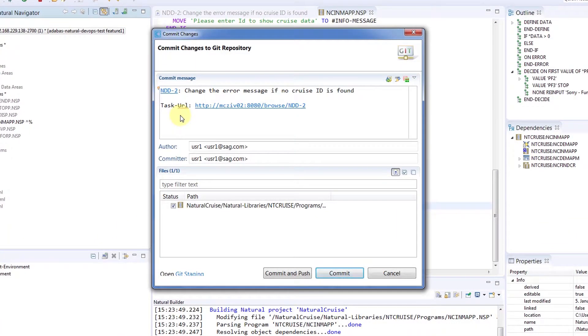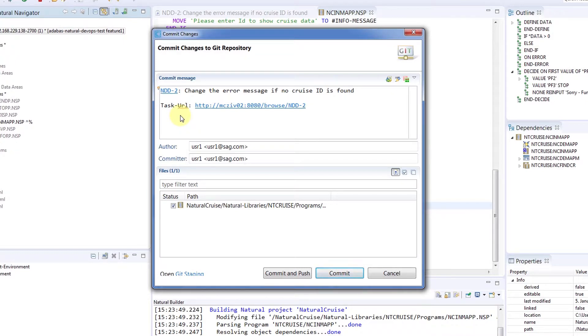Because we're working in an active task, the commit message is actually preset with a suitable comment. The commit message is important, because the issue ID creates a connection between the Git repository commit and the project management tool.